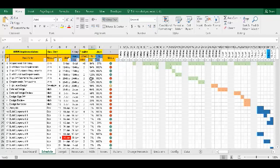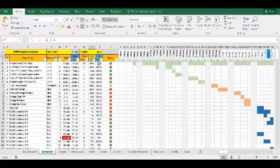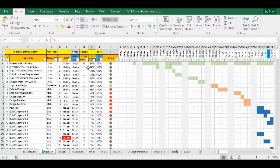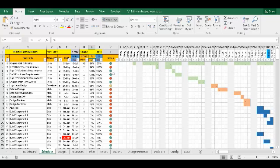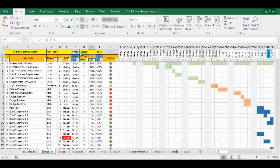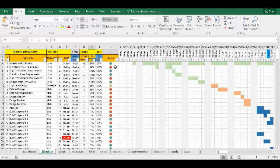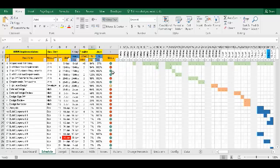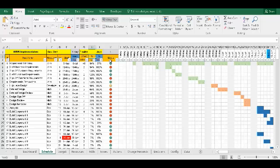So the blue fields are something that isn't auto calculated. The status is green, amber, yellow, and red. So green is when everything is good. Yellow, or amber as we call it, is when it's five percent. This is the task that you should be worried about; it's slipping. And red is when it's already gone wrong. For example, you can look here. These are one hundred percent. Most of them are one hundred percent. Should be one hundred percent by now. But they are not. And that is why most of them are flagged as red. Some are based in July so they should be fine. And the 15th of June should be okay. So that's how the table works.